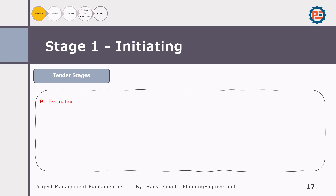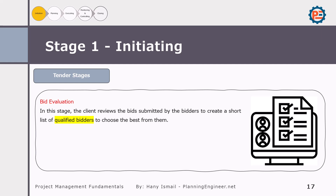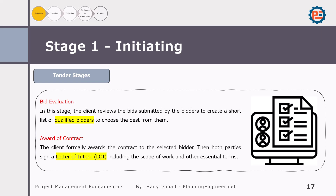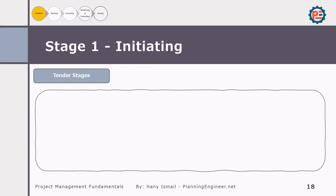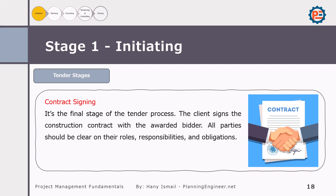The technical proposal explains how the bidder plans to execute the project, while the financial proposal provides a detailed cost estimation. After receiving the bids, the client reviews them to create a shortlist of qualified bidders and selects the best bidder based on the evaluation criteria. Once the best bidder is chosen, the client formally awards the contract — often starting with a Letter of Intent (LOI) — which outlines the scope of work and other essential terms.